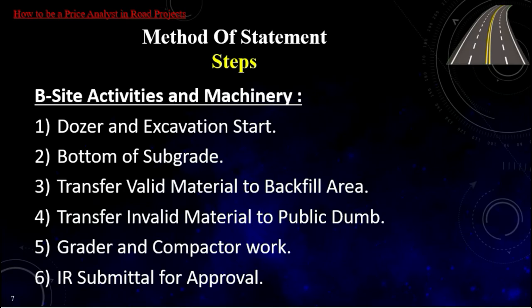If we have an excess of valid material, it must not be transferred quickly to the public dumps, it could be needed later. It is subject to the vision of the site project manager and has no relation to the pricing process.